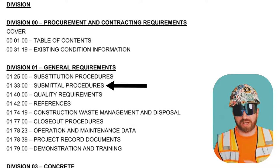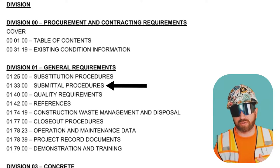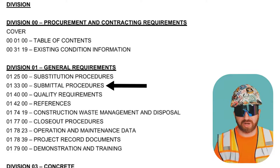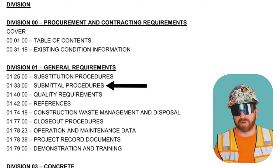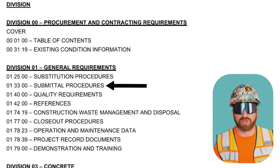Submittals are documents that contractors are responsible to provide or submit to show the architect or engineer that you're following the specifications. These are not construction contract documents, but rather meant to be a checks and balance approach to help the delivery of the project. This submittal procedures section explains how you're supposed to transmit your submittals to the architect or engineer.